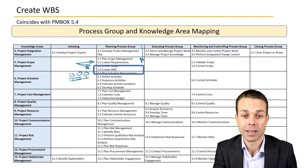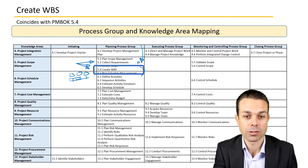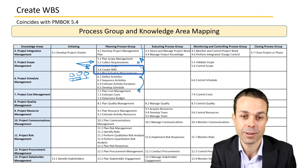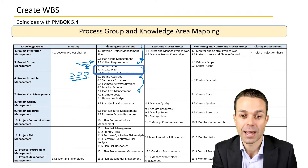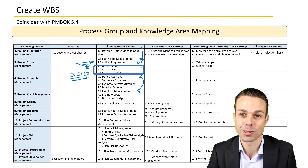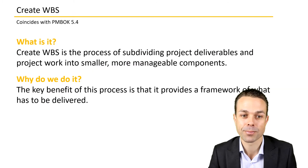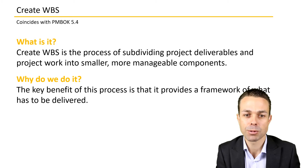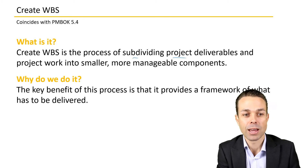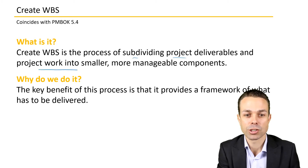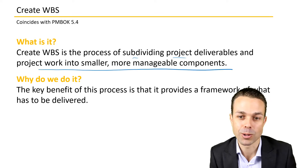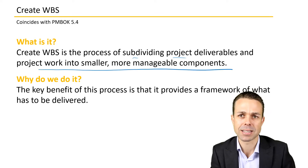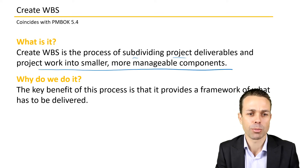Going from top to bottom in the planning process group, we're really defining that scope before we get into things like schedule and cost. The scope will actually feed into what the cost is and what the schedule is going to look like. Creating the Work Breakdown Structure is the process of subdividing project deliverables and work into smaller and more manageable components — usually activities that we can actually complete to deliver our project.